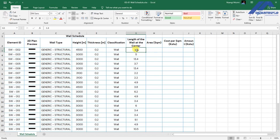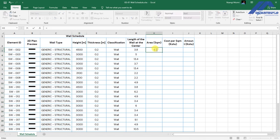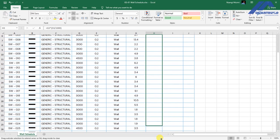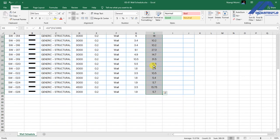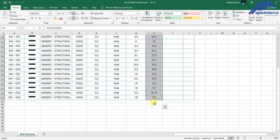For the area, we multiply length by height. The values are displayed in millimeters, so we need to convert — the formula will be: equals this length, multiplied by, open bracket, this height value divided by 1000, close bracket — so that millimeters divided by 1000 gives the value in meters. Press Enter and it gives us the area. Now move the cursor to the corner of that cell, click and drag so the formula is replicated in all the other cells, giving us the areas for all walls.